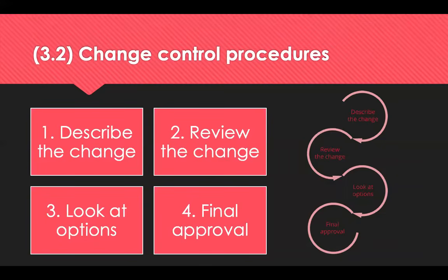Change is inevitable during the delivery of any contract. Stakeholders change their mind, new regulations are introduced or new technology is released. Change management, or a change process, is a way to authorize and make changes, but without so many changes that the deliverable gets derailed. The steps in the formal change control process are, firstly, to describe the change and the reasons for that change.